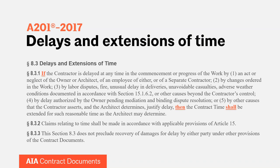When you're talking about COVID-19, the first clause that comes into play is — in our reading of the A201 and our understanding of the types of issues contractors and owners are having right now — the delay clause, Section 8.3.1, which is likely going to be triggered in more cases than others. We're going to break down 8.3.1 and talk about how it's set up and why, so there's a greater understanding of how this clause works and how it's intended to work.